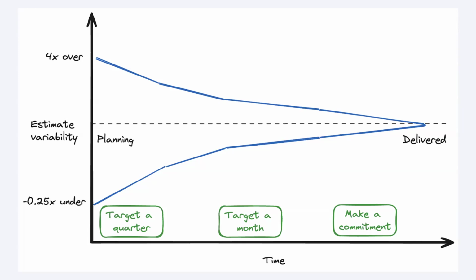So I'm sure you've all probably been in conversations where someone jokingly says, the engineering team comes up with an estimate and someone says, oh, well, you can double that, right? Well, it's actually worse. You can double it and you can double it again, because the variability really does go up to 4 times when someone actually goes out there, does the primary research, looks at all this stuff and says, how bad could this be? This could be 4 times bad. And I think we all know that sometimes the degree of uncertainty is so high in software projects that it might be 10 times the original size, because there are things you don't know up front, things that you can explain with the language of risk, that mean that variability is really, really high.